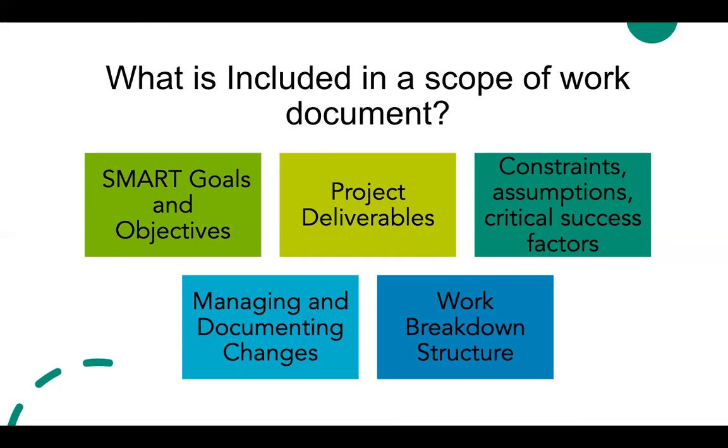The scope of work provides an outline of the process and procedures that should be used for managing potential changes made later to the scope of work for the project. This includes topics such as the authorization of changes, change orders, and managing the effects of changes on the budget and timeline of the project.